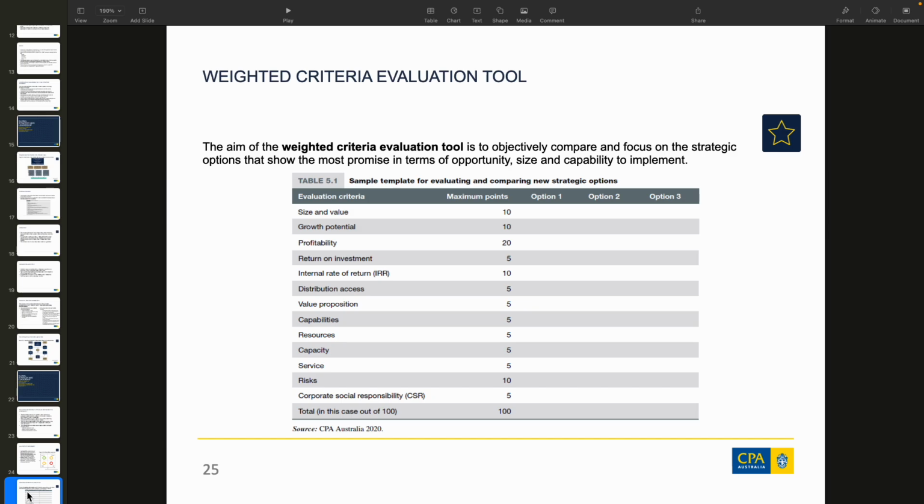The rest all I put 5. And then risk, I put 10. I put scores like this. I can put one called no go/go also, NG, no go or go. That means if that one fails, no go. Doesn't matter what else is good, no go. That's the no go/go status.